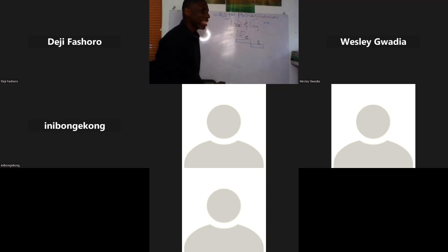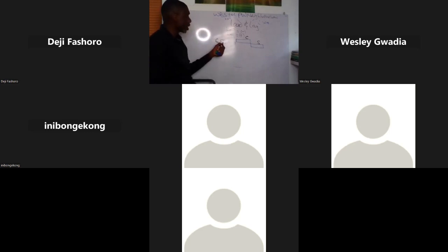If I want to introduce a lead, I will say something like this. Column should have a FS, what is FS? Finish to start. If I'm talking project management now, I can say, Mr. Wesley, can you please ensure that the column has a finish to start relationship with the substructure and a 2 days lag. So if I send you this message, CFSS -2, it means that the successor activity here is the substructure, while column is the predecessor activity. I want a 2 days lag.